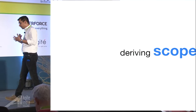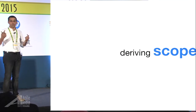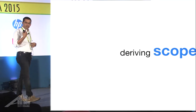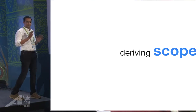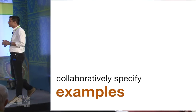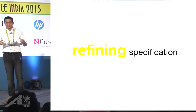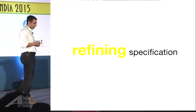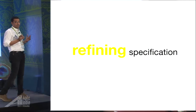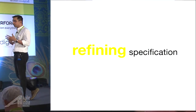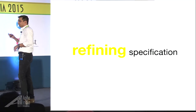Now you can start collaboratively defining examples around it. When I say collaboratively, it's not a one-person job — everyone involved in the process, BA, QA, developers, end users, POs, SMEs, everyone has to be on the same page. Once you define examples collaboratively, you refine them further based on discussion. Initially we might have started defining use cases for the flying car, but as we got into discussion, many things come to the surface that could change your scope — increasing or decreasing it. Based on that, you negotiate what exactly your MVP would look like, and refine your examples back.